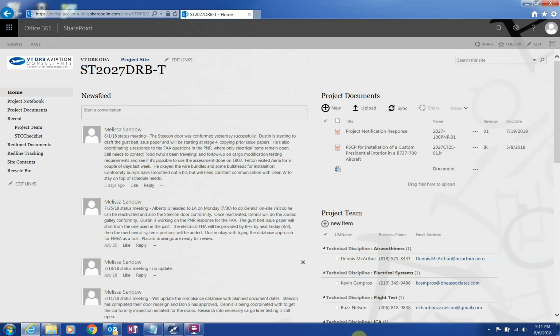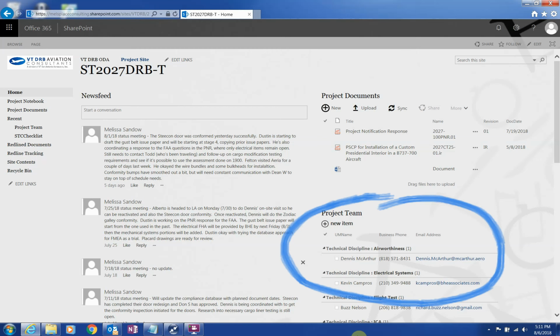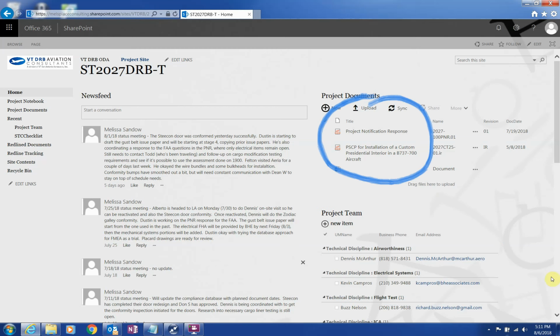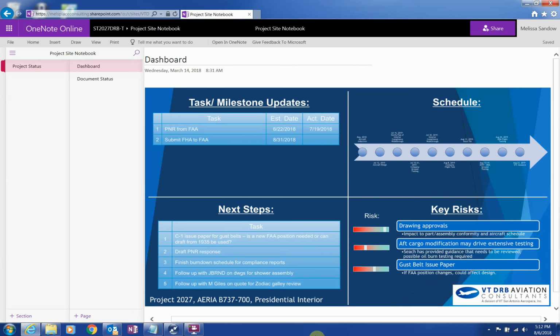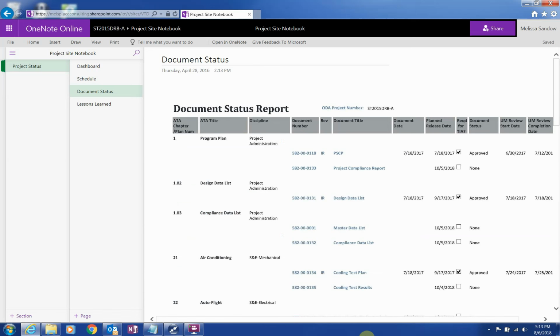When sending emails to unit members, send links to the SharePoint site so that they are reminded where the information resides regularly. In making the communication useful so that people use the site, you are expected to make regular updates, where we shoot for doing it at least weekly. At a bare-bones minimum, the site should include all the team members and their contact information, the most recently released PSCP, and current project notebook items like a 4x4 project summary sheet or dashboard, the schedule, and the status report